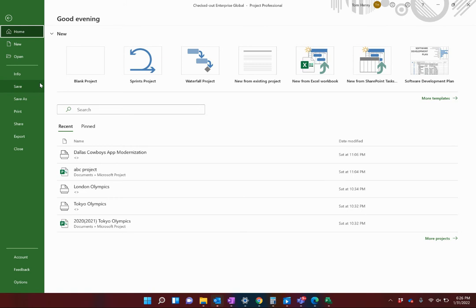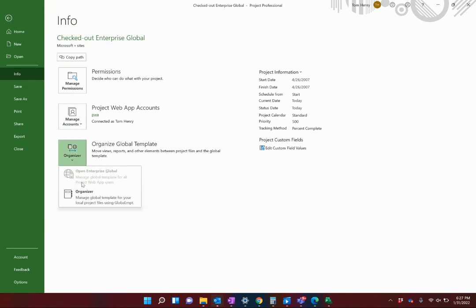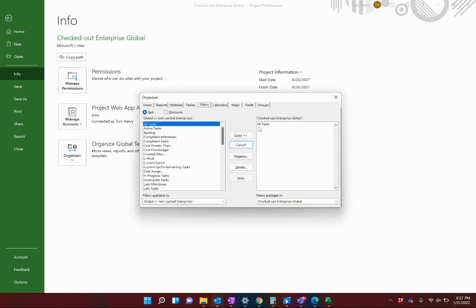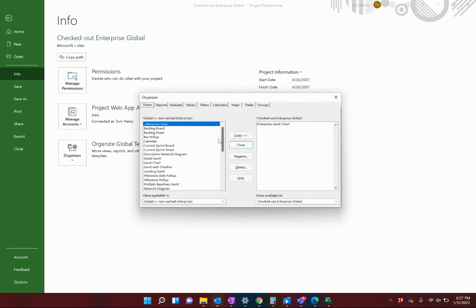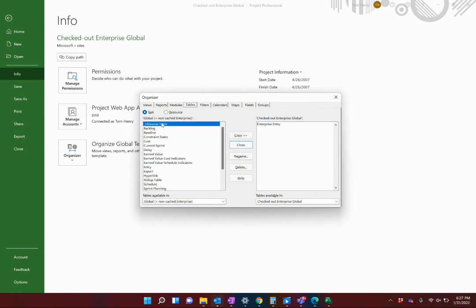The way I handle this: I don't make any changes directly in the Enterprise Global. Instead I create things in a standalone file and then use the Organizer to push them over. I'll go to File > Info > Organizer. On the left-hand side I can see all my filters — I'll scroll down to find my Milestones filter. Then in Views I've got my Milestone View, and I'll move that over to the Enterprise Global. I'll also move the Milestone Table over. Whatever you've created custom — filters, tables, views — they all need to be moved over into the Enterprise Global to be available for all future projects.